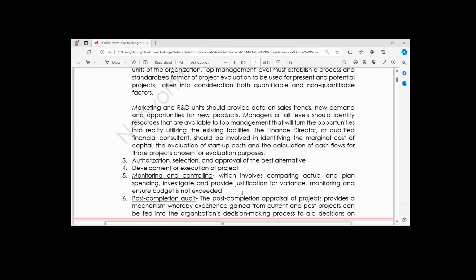Again, if you go below your budget, you also need to explain that. You need to give justification. It may well be that there's something you had in the scope of the contract before, and now you are not doing that scope again, you want to remove it. Once you remove it, that will lower your costs. Not only that, if there's an extension of time, that will also result in extra costs being incurred. So as a result, you may likely go above your budget.